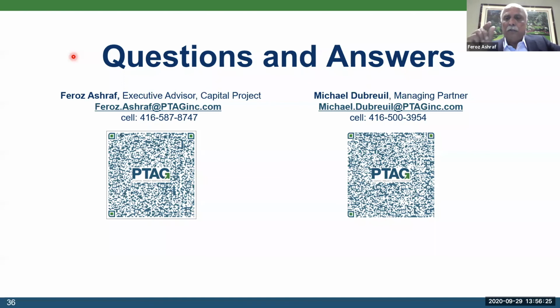It was at the interface points, the engineering and construction liaison and touch points, engineering and procurement touch points, engineering and contract touch points. Those interface points were the problem where items were missed out. So interface management is where everything happened. If you can do one thing on a project, do interface management.